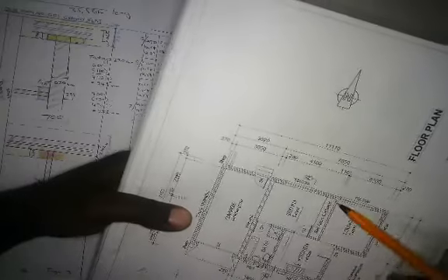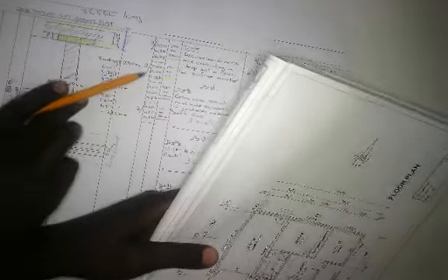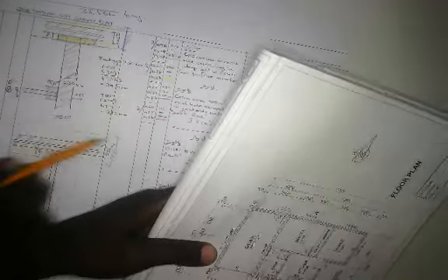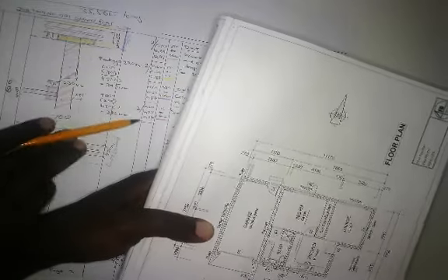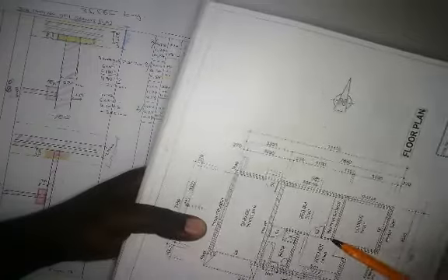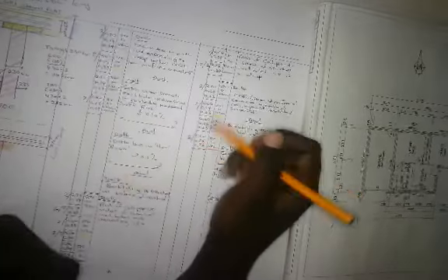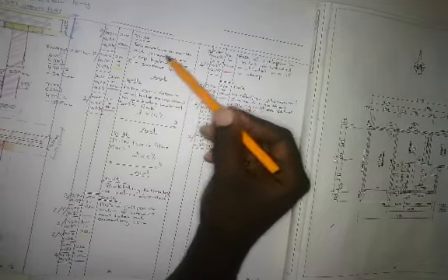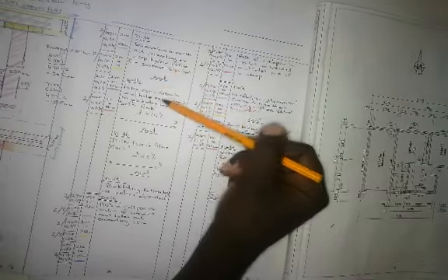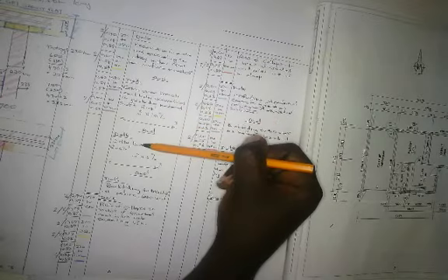So that calculation, we're going to say times 2, that we're going to deduct. And then your 230 versus 110, you're going to have 1, only because here it is only 1, and then your 110 to 270, that's 1 and that's 2. So there it is. And then you're going to have a 110 to 110 fighting against each other, and here's 1 and here's 2. So that's how you adjust for your excavations.